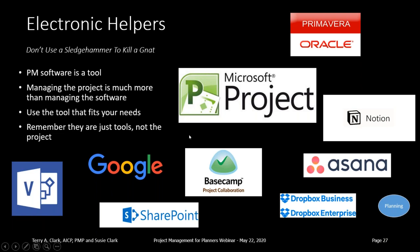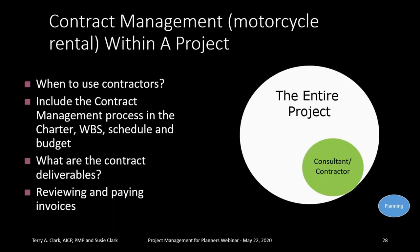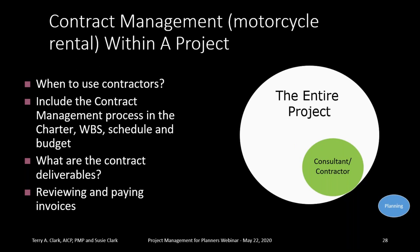One thing to keep in mind for planning projects: are you going to have a consultant or outside person contributing to the deliverable? The key point is that on the big circle — the entire project — if you're the PM, you're responsible for the entire project, including work being done by a contractor or consultant. Some people say, well, that's all being done by the contractor, I don't need to worry about it. But if that contractor's work is contributing to your final deliverable, you do need to worry about it. We tend to underestimate that.